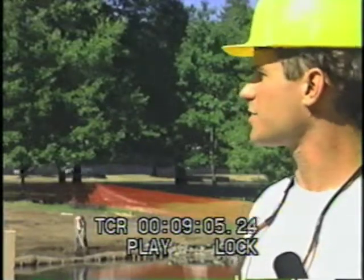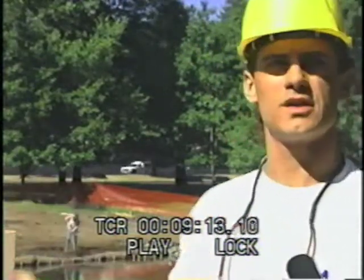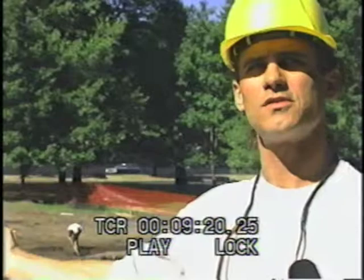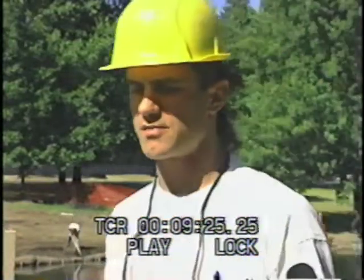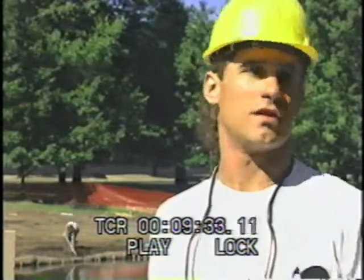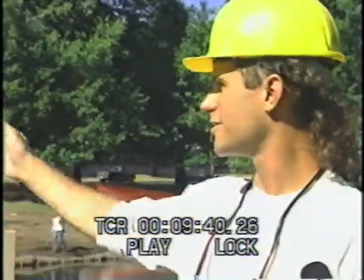There are a couple of problems with that. It created a weird space between the two structures, and the city planners would have required that we get a conditional use permit for that. If we attach to an existing structure, it's like modifying that, whereas if we build a whole new thing, it's more of a problem in itself. That was a real determinant from regulatory authorities that the students rarely have to engage with and acknowledge in the studio. It really upset a lot of the students. They really liked the idea of their own bridge going right there.